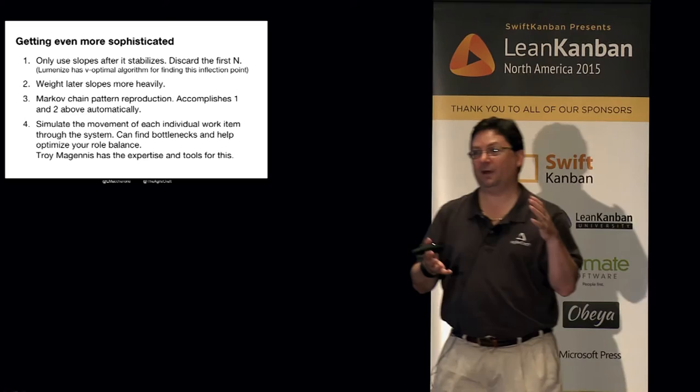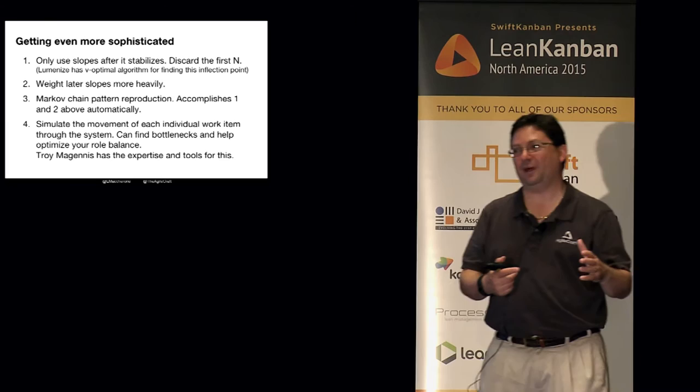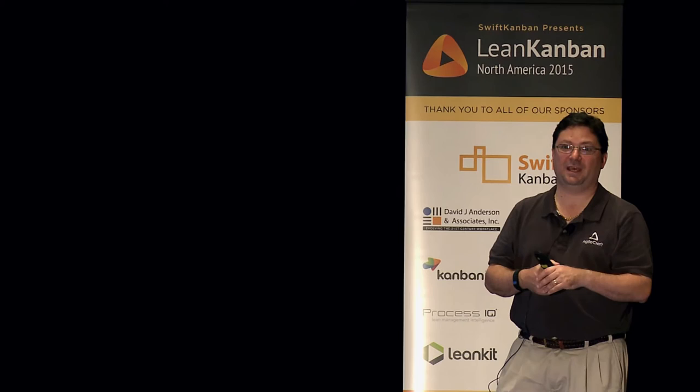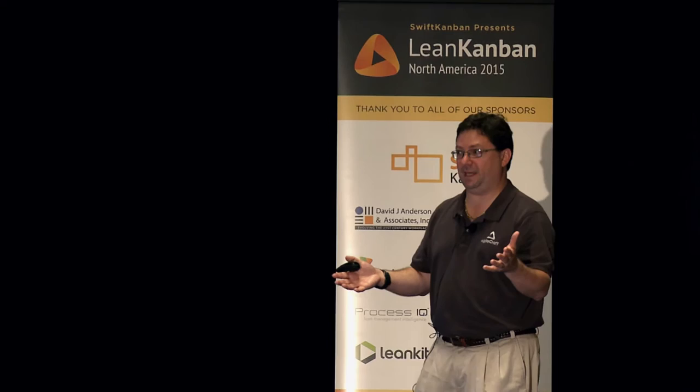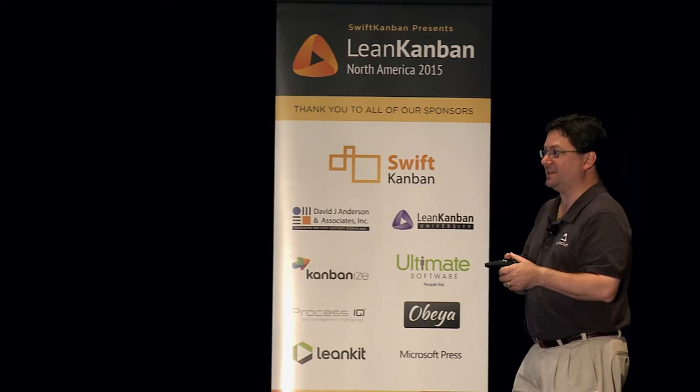Well, the instinct of every manager out there is to add more developers. But Troy finds that when he does this analysis with people, 9 times out of 10, it's not the developers that adding to actually pulls the data in. It's either the testers, or he says a lot of times it's the BA folks. It's the feeding of the individual work items into the system at a pace that the team can consume them fast.